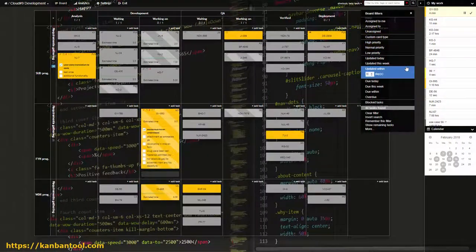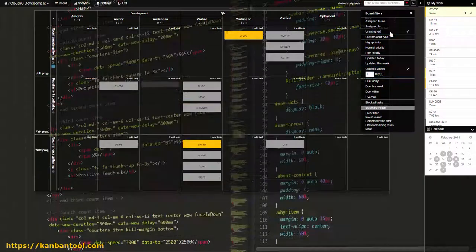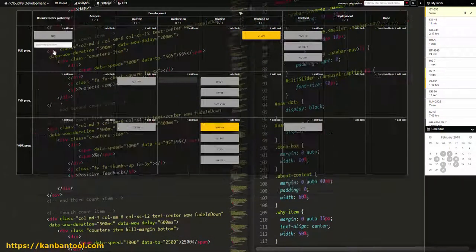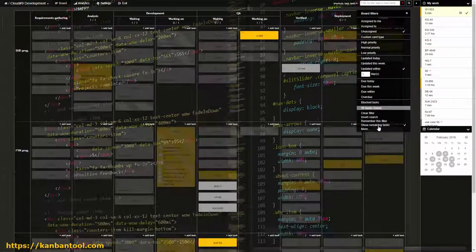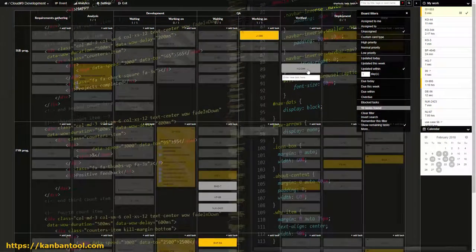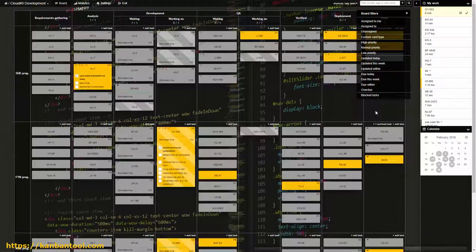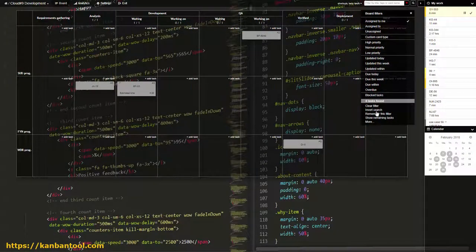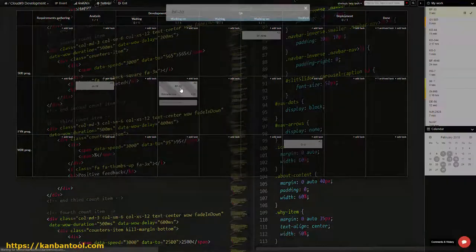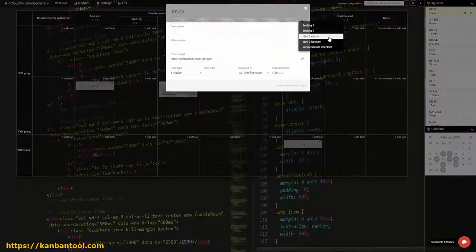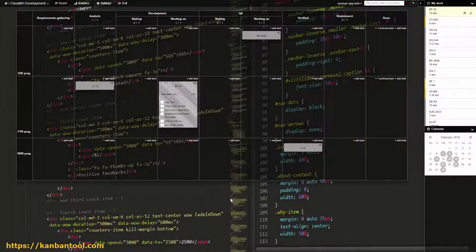Workflow Visualization, along with use of work-in-progress limits and measuring the average lead time of item completion, make up Kanban's three core principles. Following these, teams become better equipped to meet their goals and wrap their heads around what needs doing next.